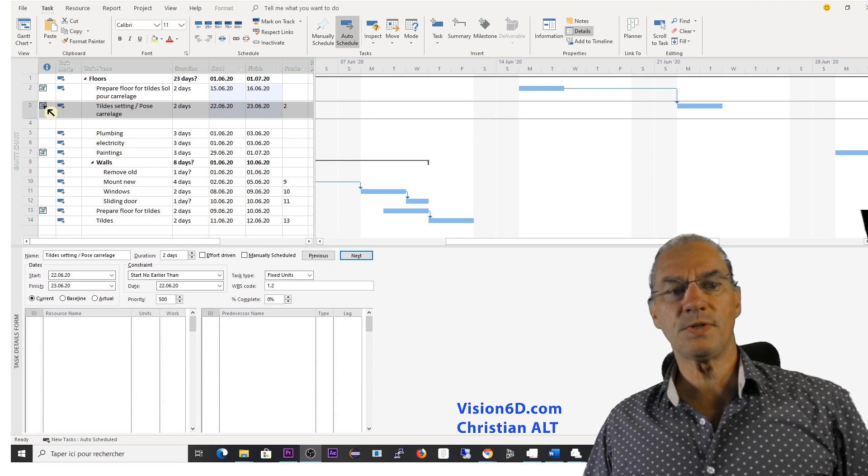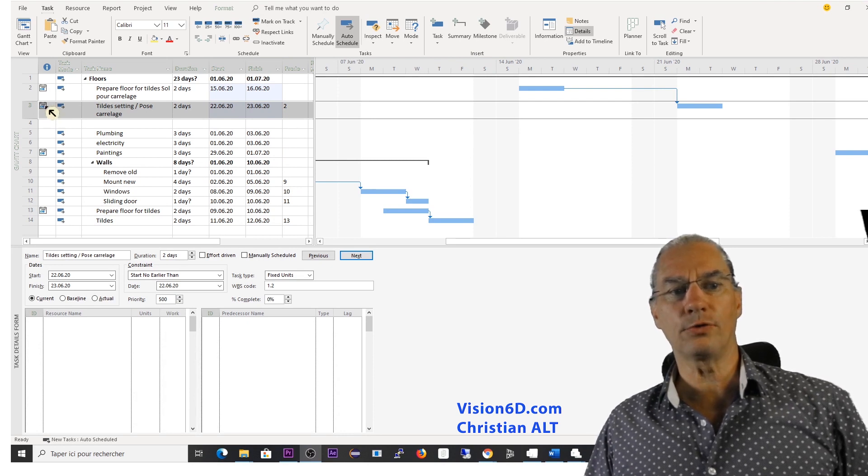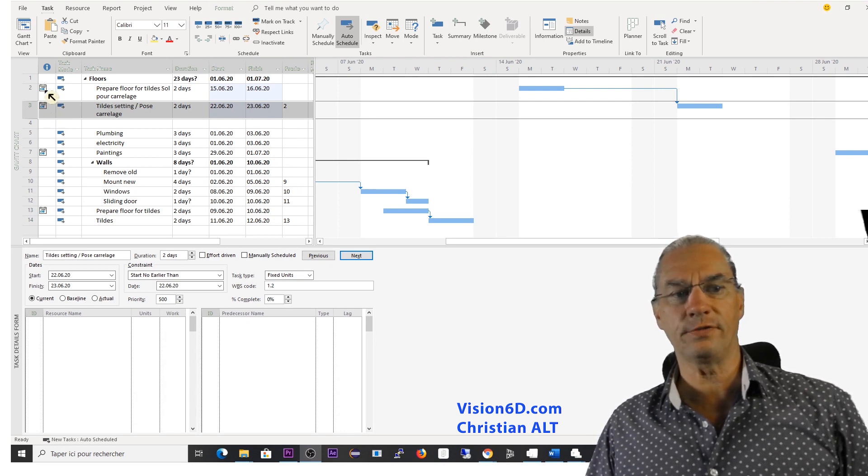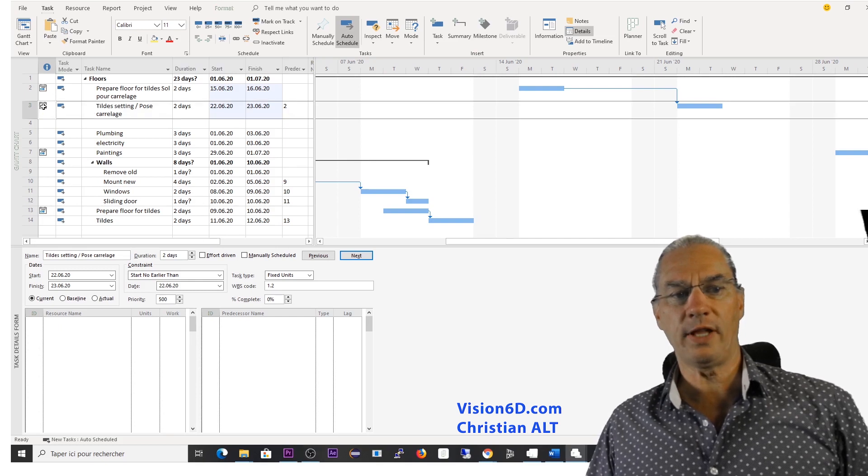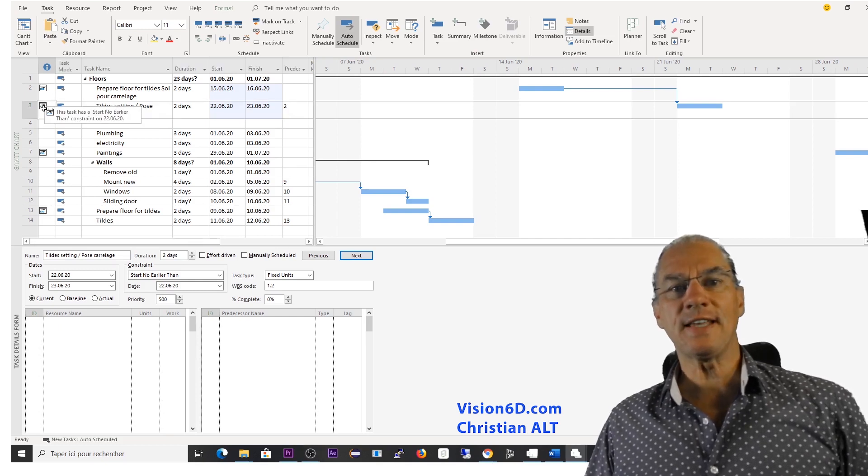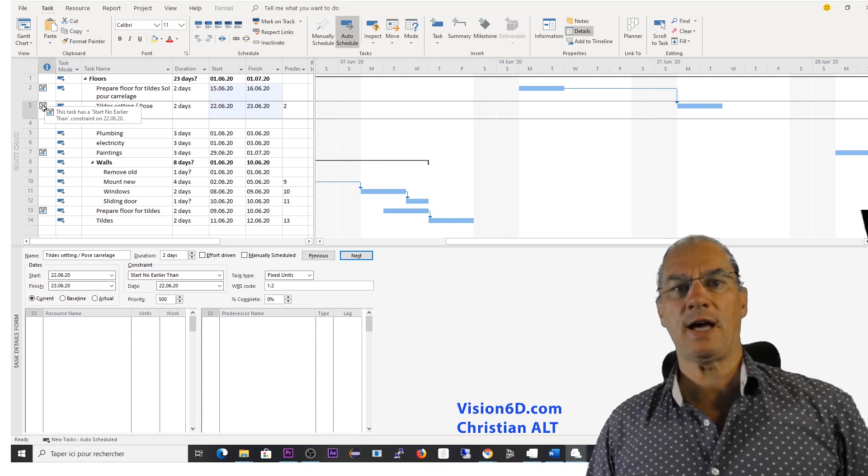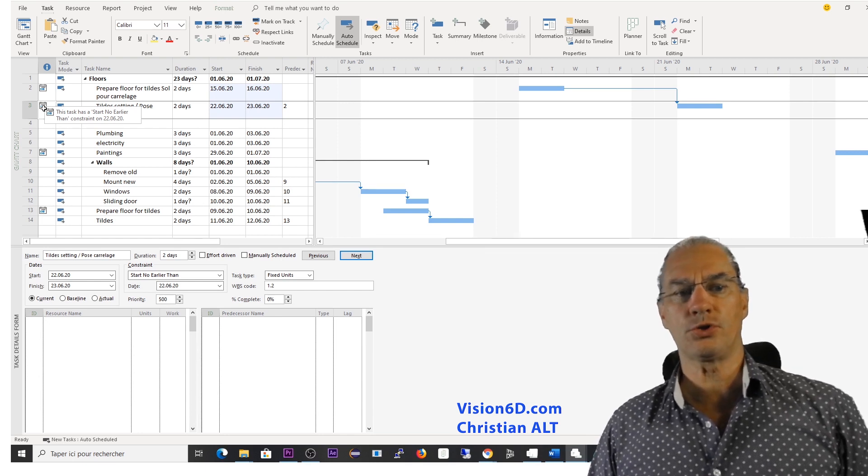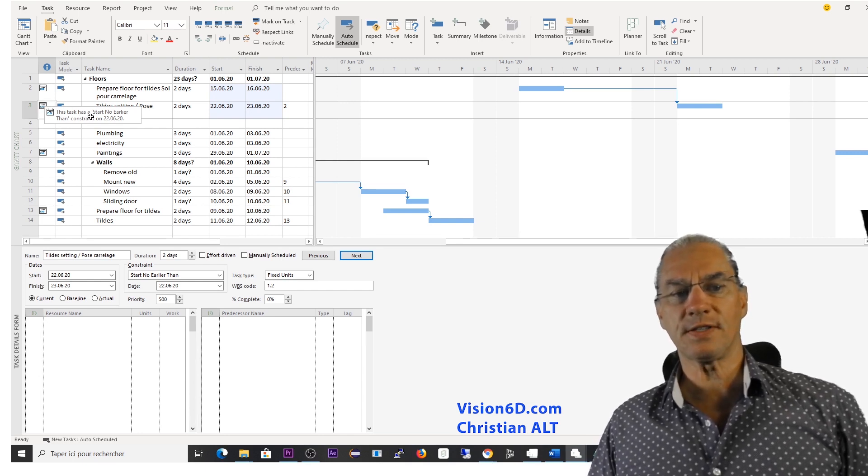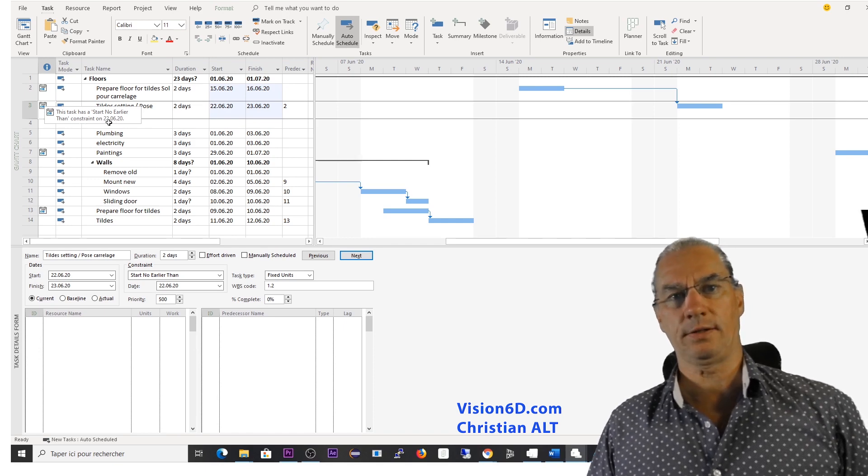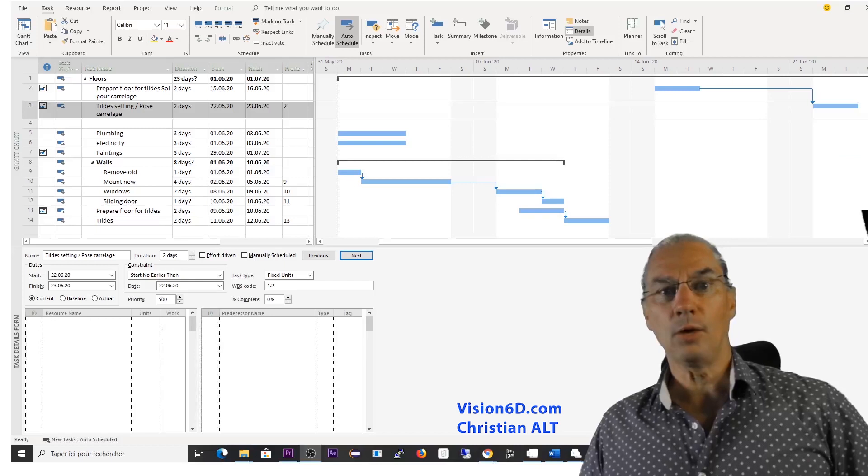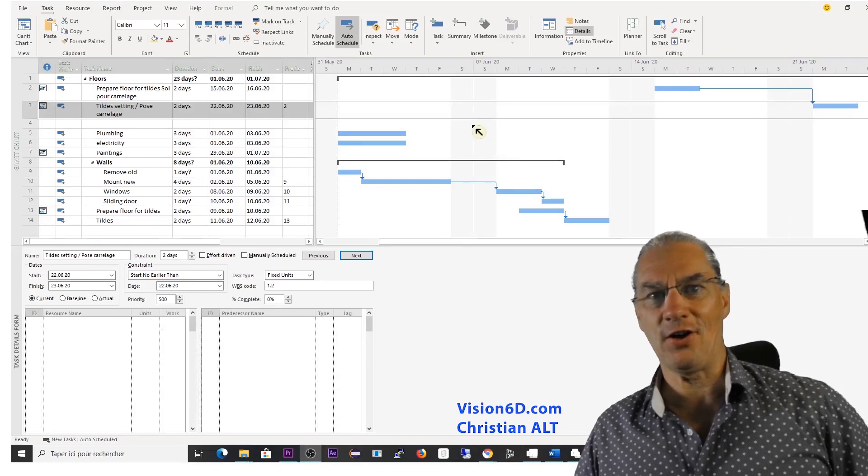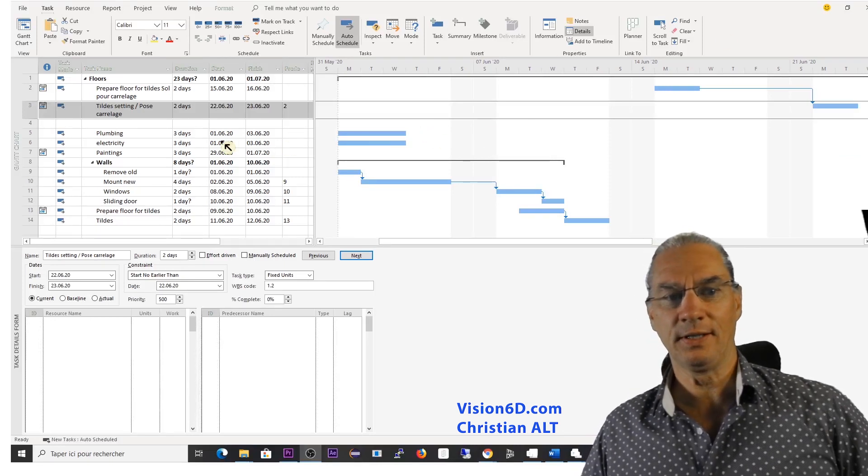Here you see that we have in the first column, the column of information, we have now an icon that came. And it's telling us that on this task, we have a constraint, which is start no earlier than the 22nd of June.